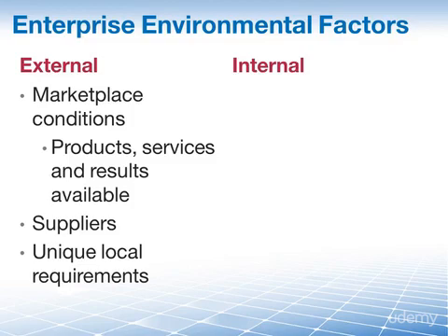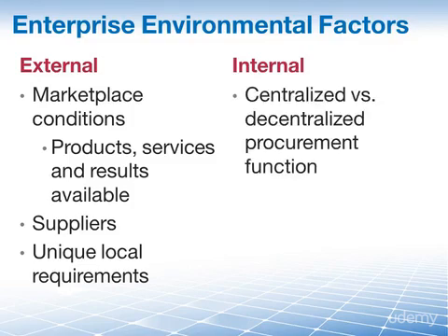And the internal factors, here we're talking about centralized versus decentralized procurement functions in our organizations. This determines how much procurement we can do ourselves as project managers within the project, or if we have to coordinate and rely on a purchasing department or purchaser outside of our project organization.